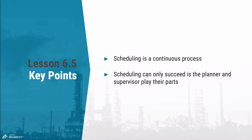To close this lesson: scheduling really is a continuous process — a conveyor belt of buckets of work that the scheduler continuously fills to capacity based on priority, due dates, and so on. We also saw how important it is for the maintenance supervisor to advise the scheduler on future labor capacities — the size of the buckets — and for the planner to maintain accurate work order statuses for fully-planned and ready-to-execute work. If people in either of these roles are not fulfilling their responsibilities consistently and accurately, your scheduling process will suffer. Make sure your maintenance planner and maintenance supervisor understand their role in the scheduling process.